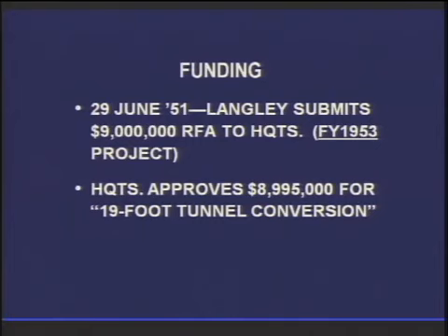Well, these RFAs are not very long documents. They're just 2 or 3 pages. And all the spade work had been done. The hard work is getting cost estimates and the justification. Regeer had already written the justification. Technical services had already gotten the cost data. So it's just a case of somebody putting together a 2 or 3 page write-up and firing this thing up. This is going to be a fiscal year 1953 project. This would mean it would start, the funding would become available July the 1st, 1952.